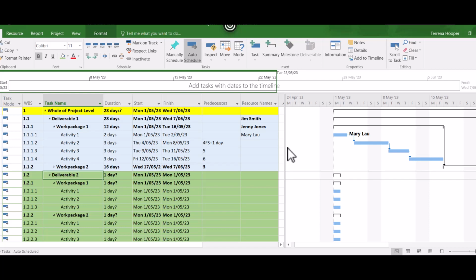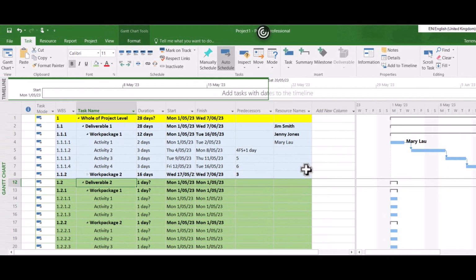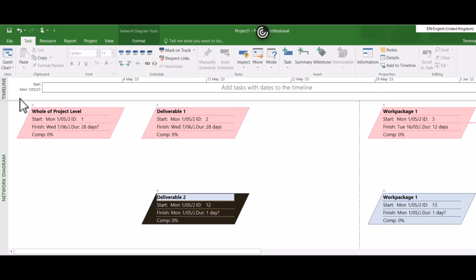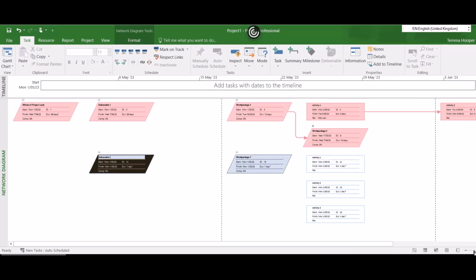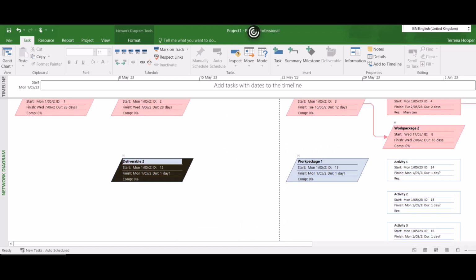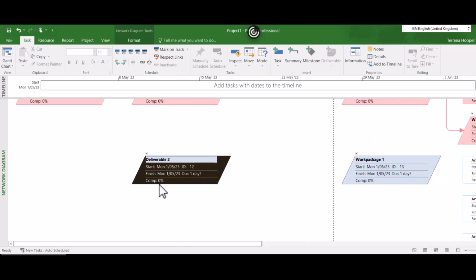It's terrific. It's also starting to calculate costs for us. The other thing it's starting to build for us in Microsoft Project is a network diagram. It automatically does this for us. I'm just going to minimize the view here, and it's already starting to show us in red what the critical path is. So where you might be doing your network diagram by hand, in Microsoft Project it will build it up for you, and it will give you lots of good information.